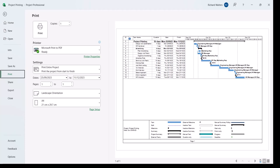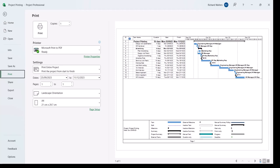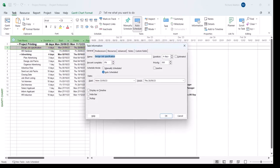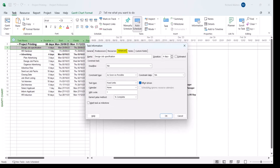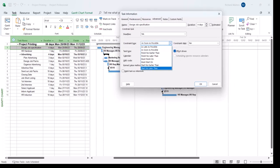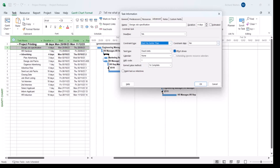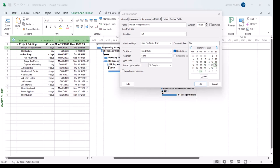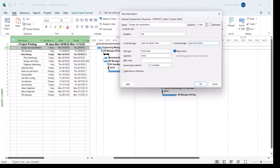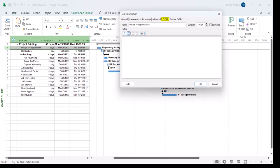We're also going to look at printing when a constraint and note has been applied. I'm going to go back into project. I'm going to apply a constraint to task 1 to delay the task by 10 working days. This task starts on the 25th. I'm going to click on the 25th and work forward 10 working days, which is the 9th of October.